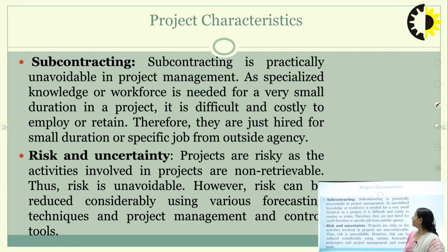Now, subcontracting. It is practically unavoidable in project management. We cannot avoid it, as specialized knowledge or workforce is needed for a very small duration in the project. It is difficult and costly to employ or to retain. Therefore, we can say that they are just hired for the small duration or specific job from an outside agency. Right? If you want a specialist, knowledgeable person or workforce for a short duration of time, and you employ them, this is definitely going to increase the cost of the project as well. So, what is the solution? That you can simply hire for a small duration of time.